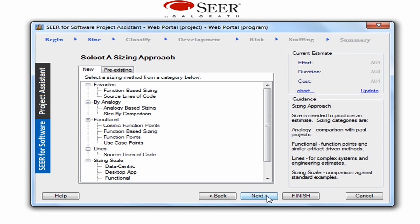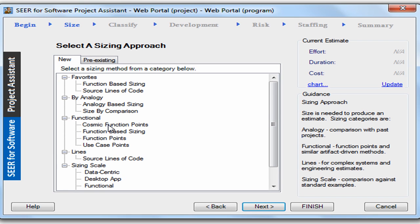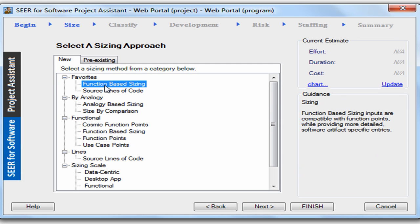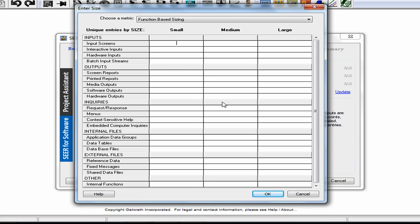I'll click Next and we're presented with the sizing screen. We could use traditional lines of code or one of the function-based approaches. I'm going to use one of my favorites called function-based sizing. We're going to be using two or three input screens — I'll assume there'll be two inputs for each screen, for a total of six. We're going to have screen reports, so I'll enter one for each of the screens.